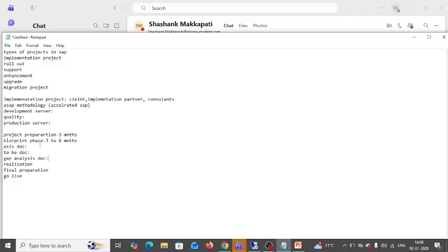Actually, the gathering activities can take 2 to 3 months. Here I have mentioned up to 6 months. In this, for gathering only, it will take 2 months. And to do all these documentations, it will take around 3 to 4 months. Suppose it is considered as 6 months: 3 months for gathering the information, and 3 months for the documentation. I was surprised why it takes 3 to 6 months, but now I got to know.